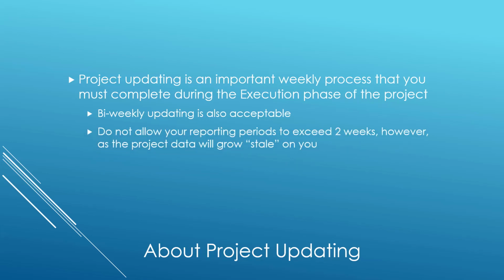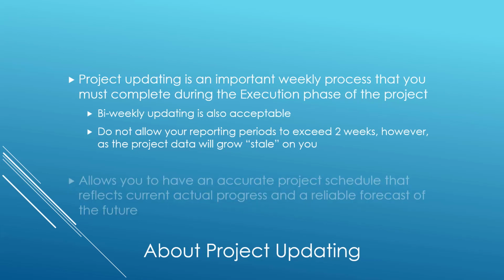However, do not allow your reporting periods to exceed 2 weeks because your project data will quickly grow stale on you. By stale, I mean that the current state of your project is old and unreliable.